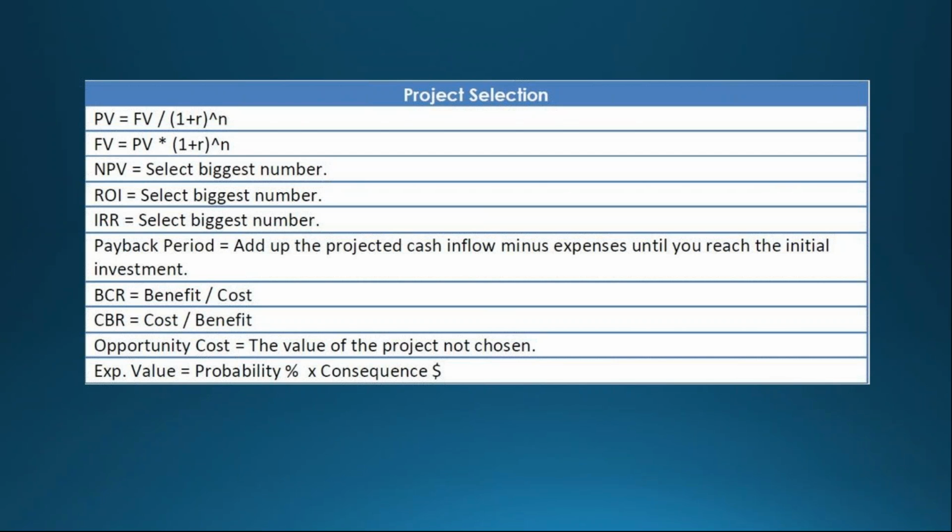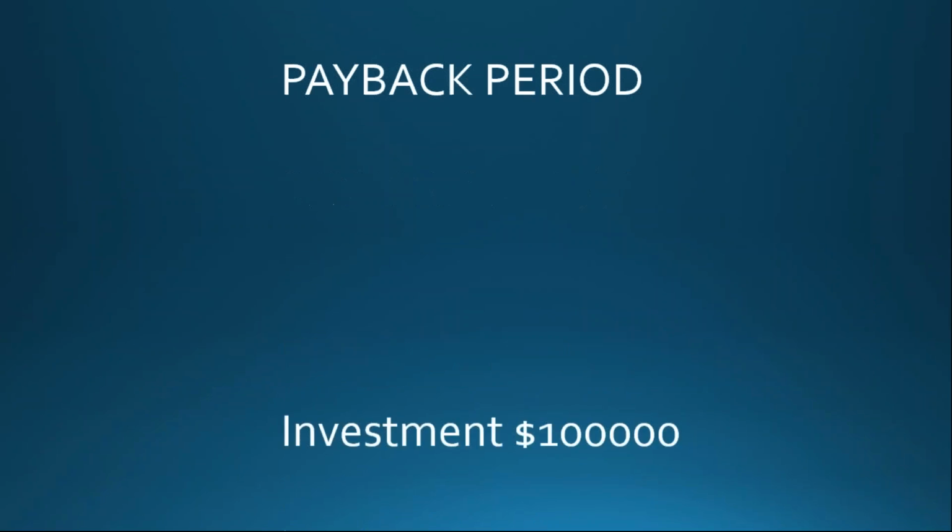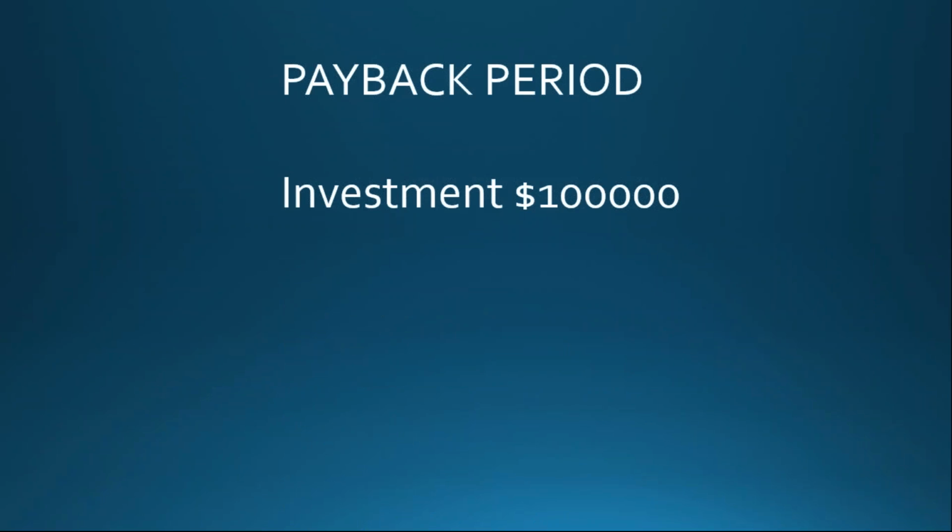Okay. Payback period. I'm going to show you a couple. Let me just show you a couple of these screens. All right. Let's start with the most simple. This is payback period. Simple payback period does not take into account the time value of money. All we're trying to do is, day one, I laid out $100,000 in an investment, and I expect inflows to come in. At what point do I, in raw dollars, get my $100,000 back?